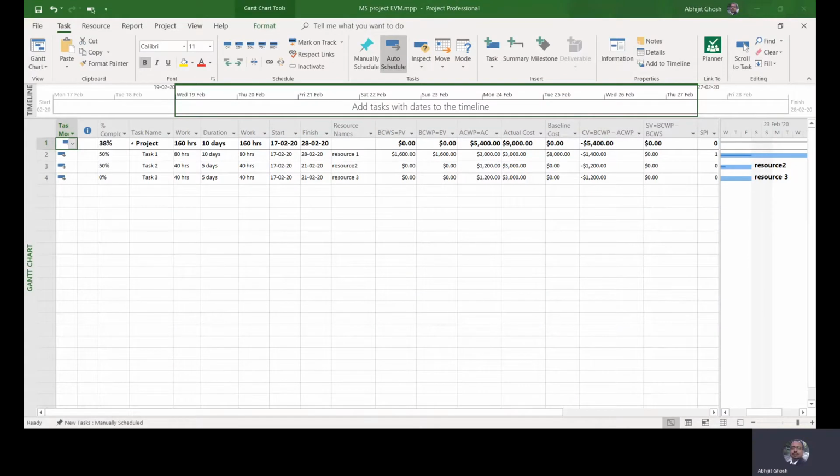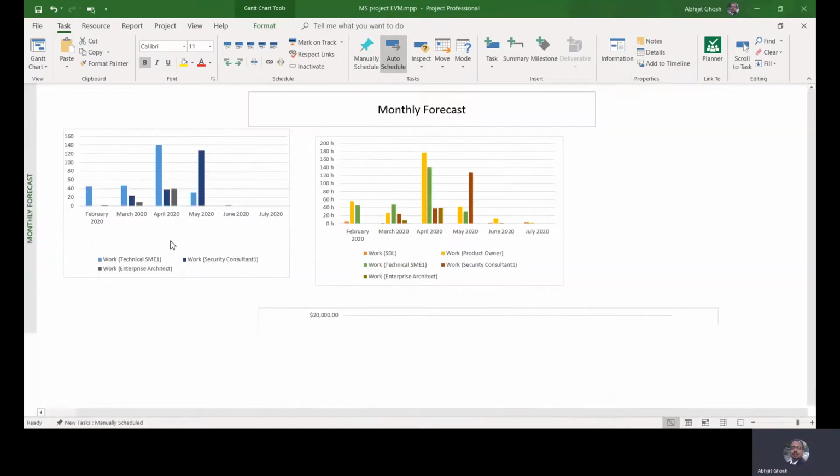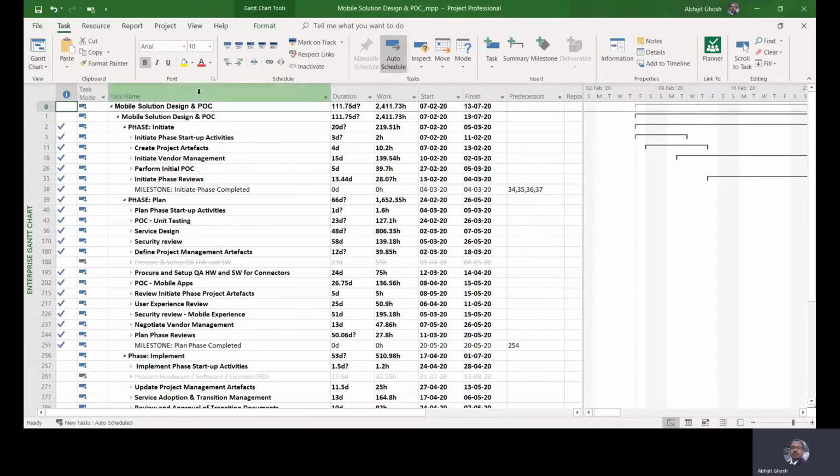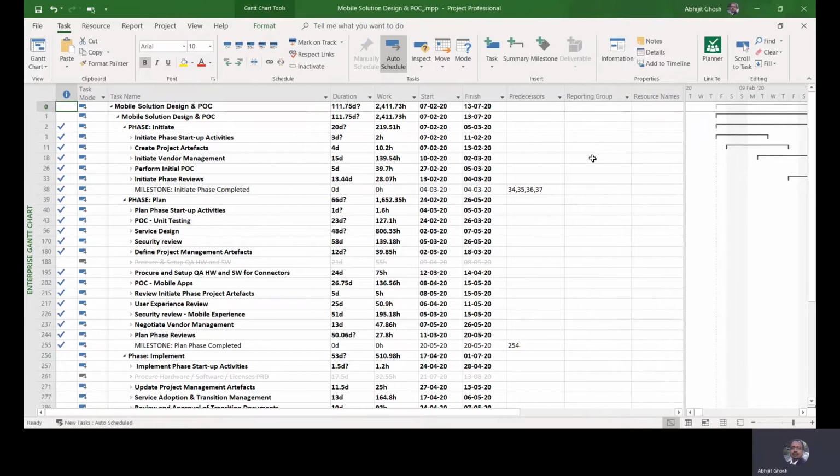You also learn about the best tips and tricks in laying down a project plan. For example, you do not assign predecessors, dependencies, or resources to your group-level tasks, and there are many more such practices, the absence of which would hinder you from carrying on with project plans that are free flowing. There are many things, and I'm going to show you the negative impact of making such mistakes.